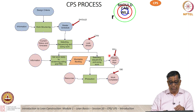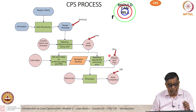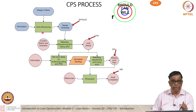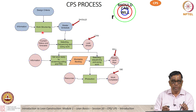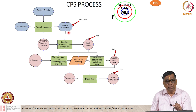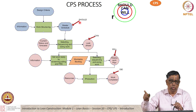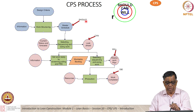This is a very famous chart in the CPS process. Initially we start with the design criteria. I have not talked about work structuring, which is actually the starting point for CPS where we work out the construction methods and overall systems. At that time we make the master schedule, which has the milestones and major commitments. The client says you should do this by a date, you should do that by a date — the emphasis is on the word 'should.'